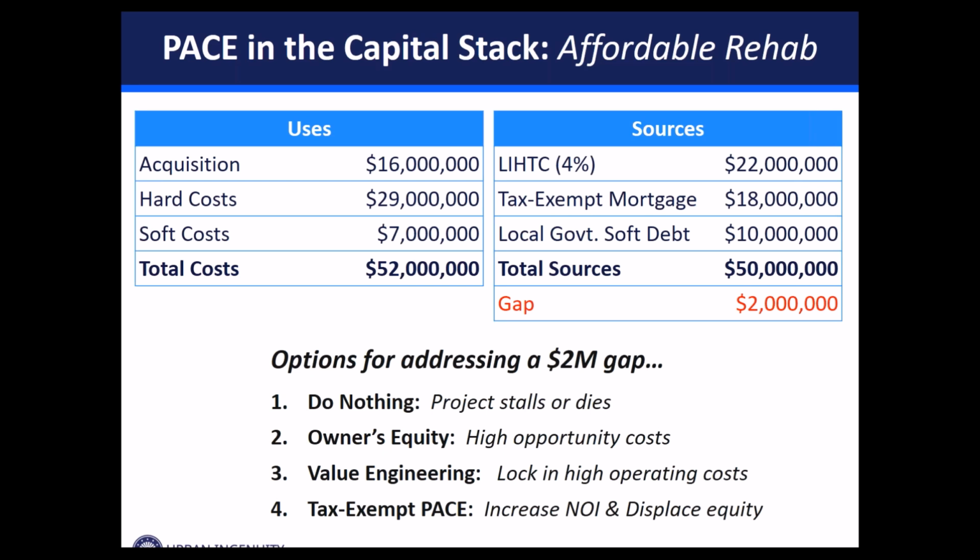I wanted the LEED gold, but I'm not gonna. I wanted to do the super efficient boiler and solar and the triple glazed windows, and I'm going to put in the cheapest first cost boiler, the cheapest first cost windows, and the solar's gone. So that value engineering strategy is something that we very commonly see.